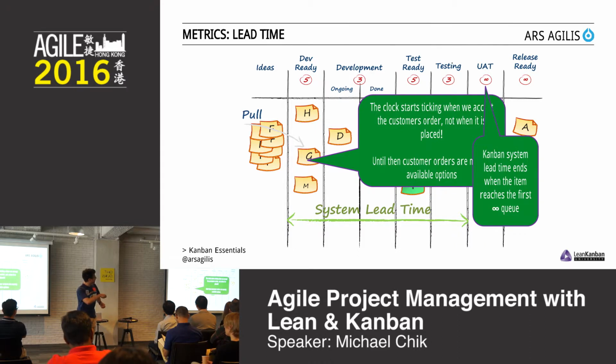And this is also one of the big levers in Kanban, and how we make sure that it's fully agile. If you limit your commitment to, in this case, 5 items, you can reduce it to 3 items or maybe 1 item. It depends on your organization. You can change your mind about everything else that's outside there at any time. So the clock starts ticking when there's commitment from both sides.